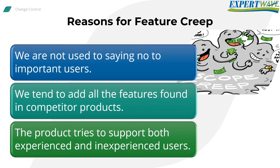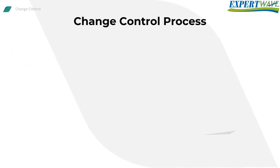Feature creep should be controlled using a change control management system. The bigger the system, the more formal and controlled the change control system should be. The process of change control is generally performed as a series of steps.